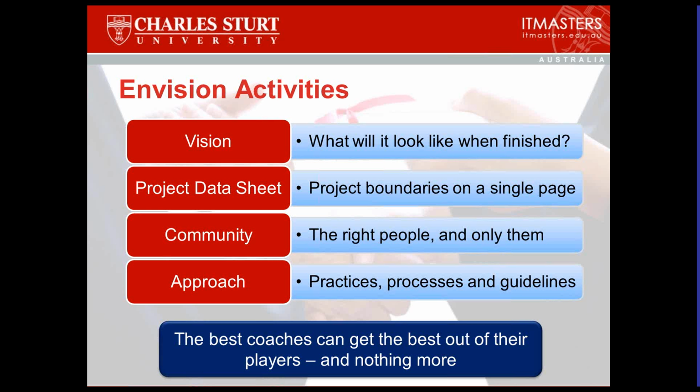For example, a testing practice that talks about how we test. If we have some demanding and non-flexible standards of quality, then we might need to have some fairly rigid practices in regard to testing, especially if we have an arrangement that makes it quite financially penalizing to us if we don't meet those quality standards. So the difference between a practice and a process is in the flexibility. A practice is more about setting the boundaries of how we conduct ourselves and how we act and perform, whereas a process has more of a join-the-dots method to it.